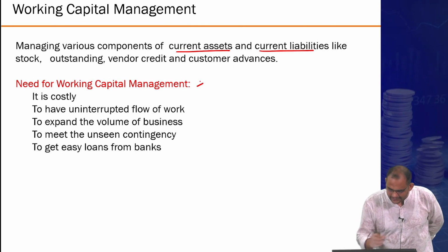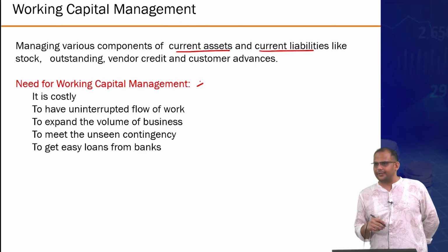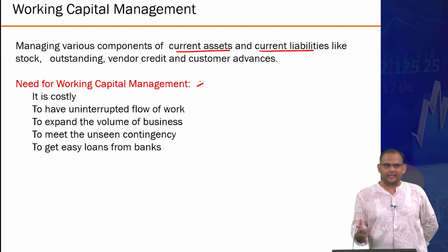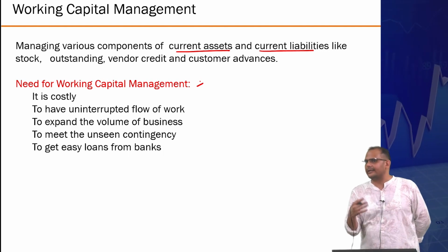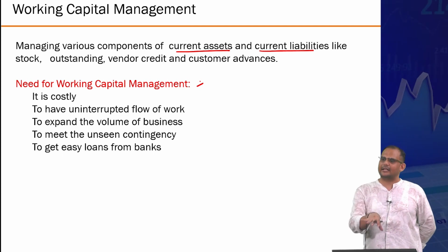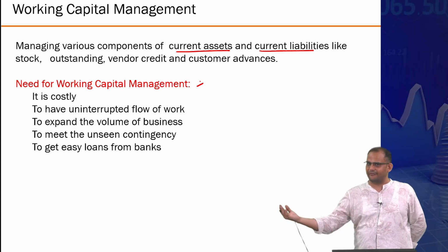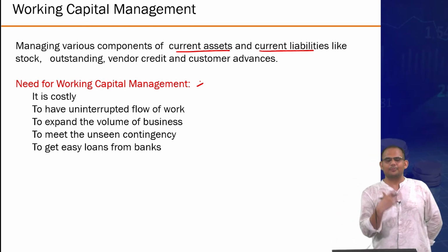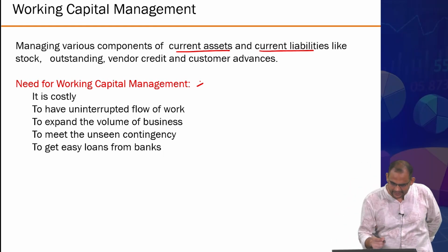So, the need for working capital cost management. Why do you need to do it? Of course, it is costly. Your money is stuck. It is not being productively used. It is not generating any returns. The money stuck in working capital could have been invested somewhere else to give you higher returns. Right now, it is not. So therefore, too much is not a good idea.